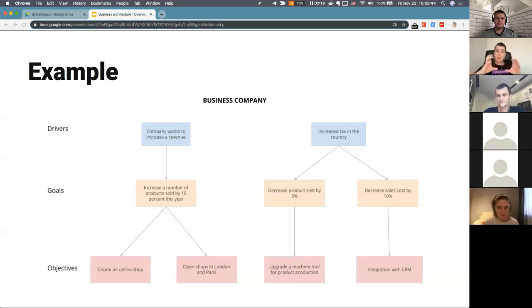But as soon as we started asking lots of questions about the project, the stakeholders, the drivers behind the goals, it turned out that the client didn't know the exact goals, and it took a few weeks over the course of that conversation to figure out the project shape, and it turned out that it needed to be literally a new project, totally different from what is currently there, because the project was done following the client's requirements.